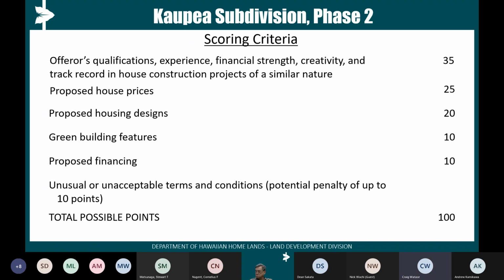The other thing is, how are you mitigating the reality of the cost? Because in a previous RFP, there was a situation where a respondent lowballed his construction prices, received the award, and then later on had to come back and ask the department and the financing agencies for more funds. I think that affected the scoring tremendously and could have created a different outcome. So I'm wondering if the department is considering that and how they're mitigating that.